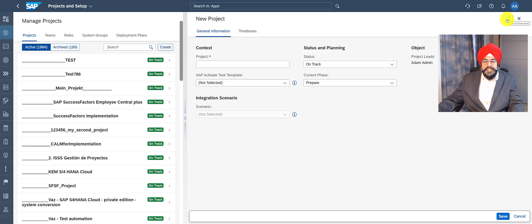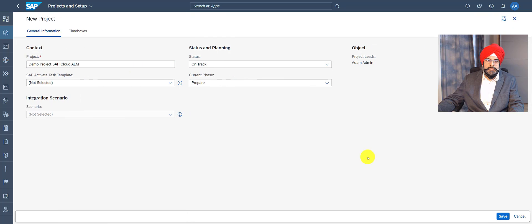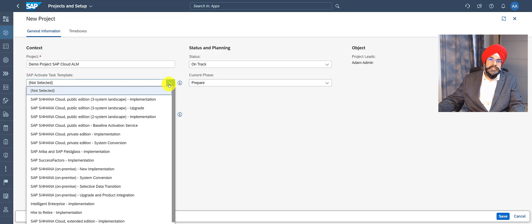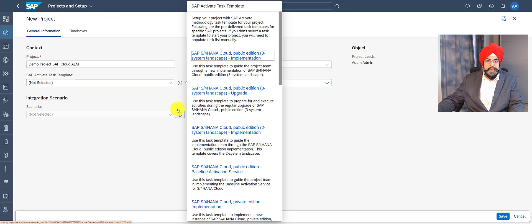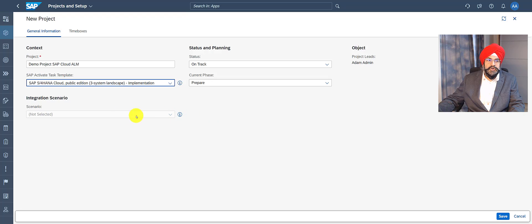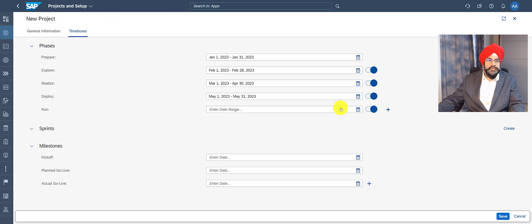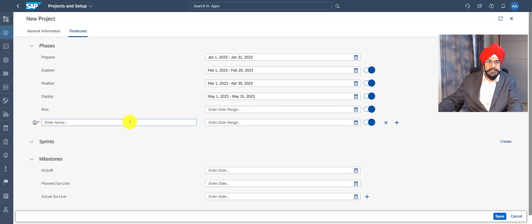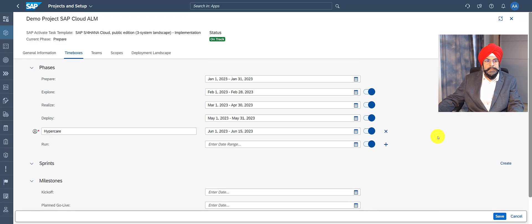You can click on this control to see the screen in full view. I've given my project a title and now I can proceed by selecting an activated template. I can see multiple templates have been published by SAP already, so I can pick one as my starting point, and if I'm not sure I can click on the info icon to know more about it. So in this case let's start by selecting a 3SL template. For this demo I'll skip the step for SAP Central Business Configuration and directly proceed with the timebox creation. I've added the dates for the first four phases and I missed the need of a hypercare phase, so let me quickly add a custom phase.